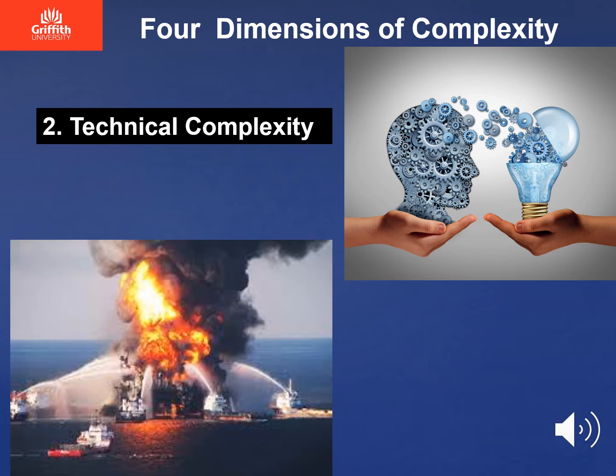The issue is that if you are contracted as a project manager after the design phase, you will need to deliver solutions to ill-defined technical problems. And there's nothing you can do because somebody else has already defined those interdependencies when they defined the architecture of the product. Another challenge that you will need to face is to manage the expectations of key stakeholders regarding what the technology can do.